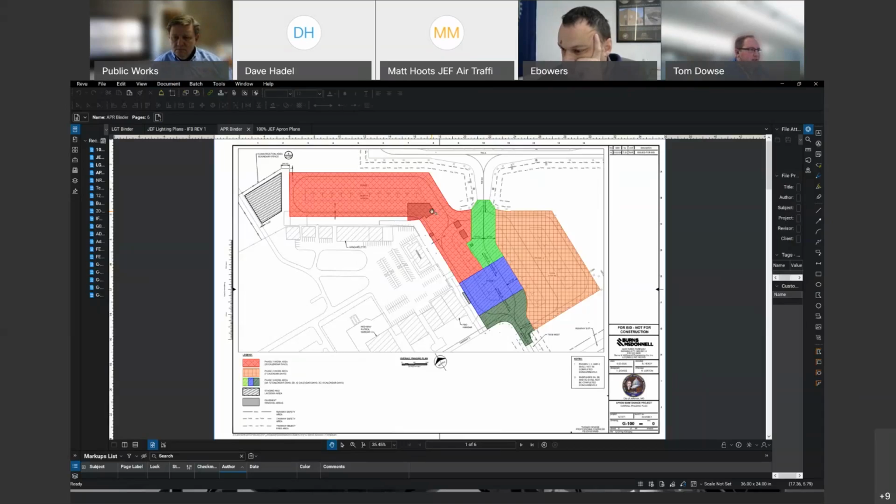That's the intersection with taxiway Alpha 1 to the ramp. And 3B will be the area in front of Jeff City Flying. And then 3C will be the Charlie and B West intersection area. So it's broken up to try to minimize impact to different areas where we can also keep traffic flowing for construction equipment for those bigger repair areas in phase one. So, like I said, 65 calendar days overall. First phase, we're looking at about 26 days.